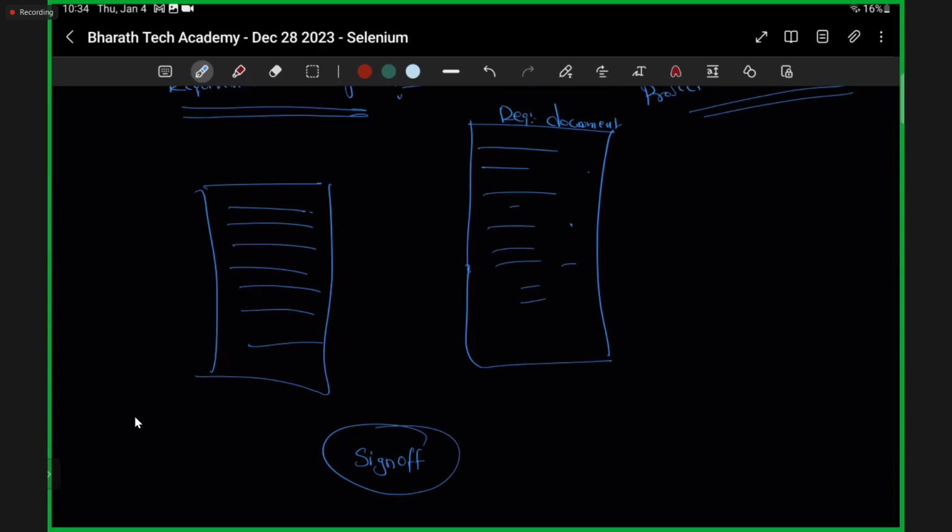Along with that, they are going to include all the major stakeholders and the project manager, and write all the details: these many features we agreed to implement, these are all the timelines, and these many resources are going to be involved. They are going to clearly mention all those things and ask for approval from our client.